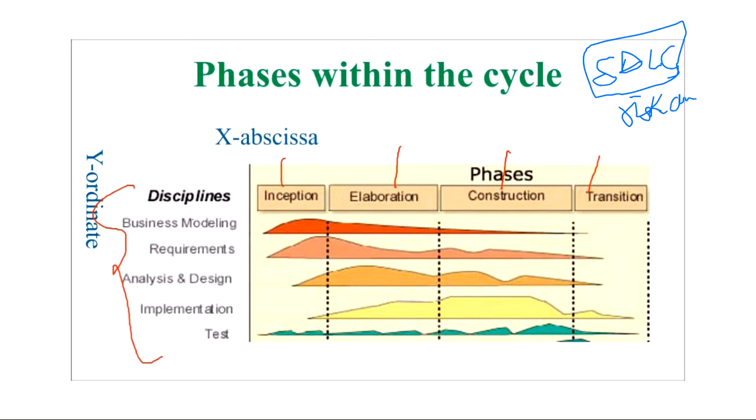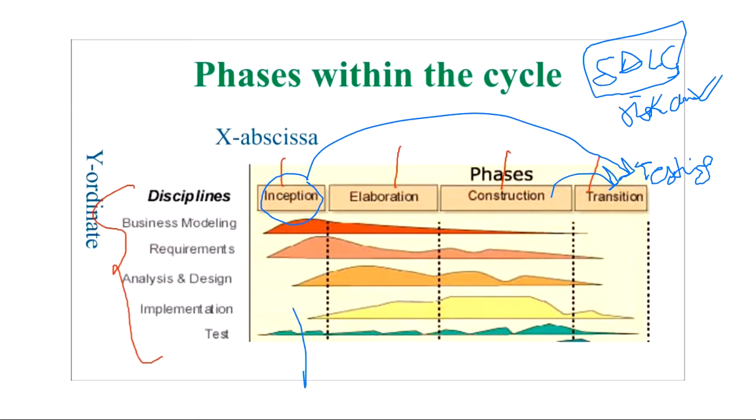If you have been given a project and you start from the inception phase and go to the deployment or the transition phase at last, and you didn't perform risk analysis even once, and you think that at last, after the construction part is done, in the testing part only I will do the risk analysis, then definitely there is a very high chance that your project will fail. You have to perform risk analysis and testing in all these phases. Do just a little, but you have to perform risk analysis and testing in all these phases,